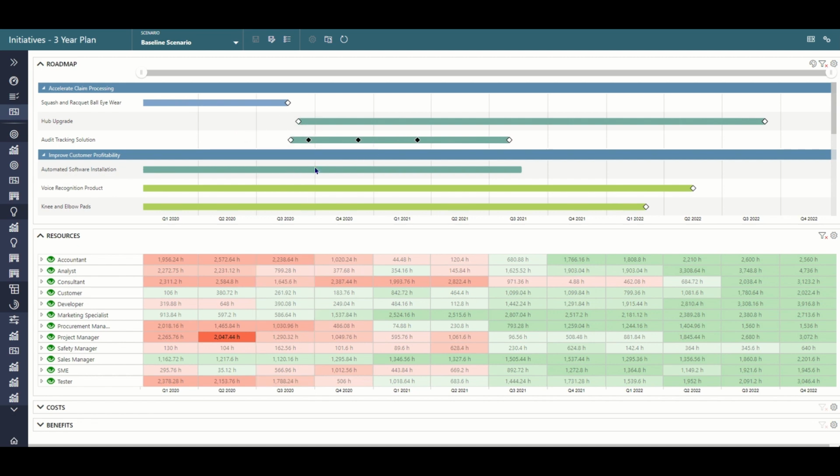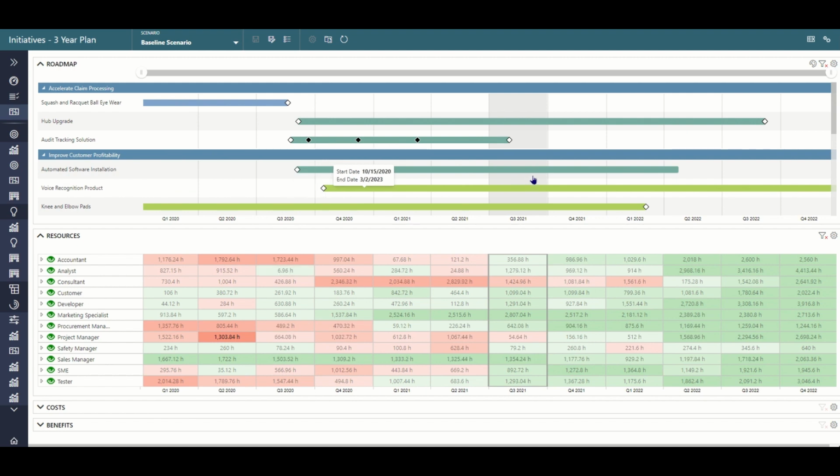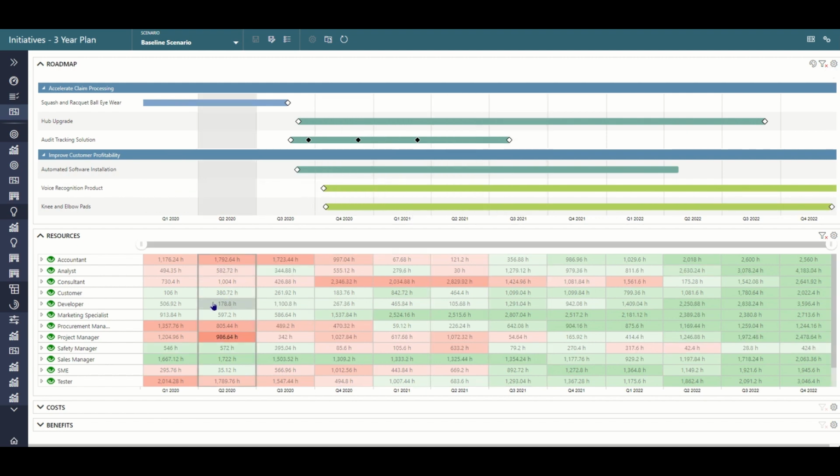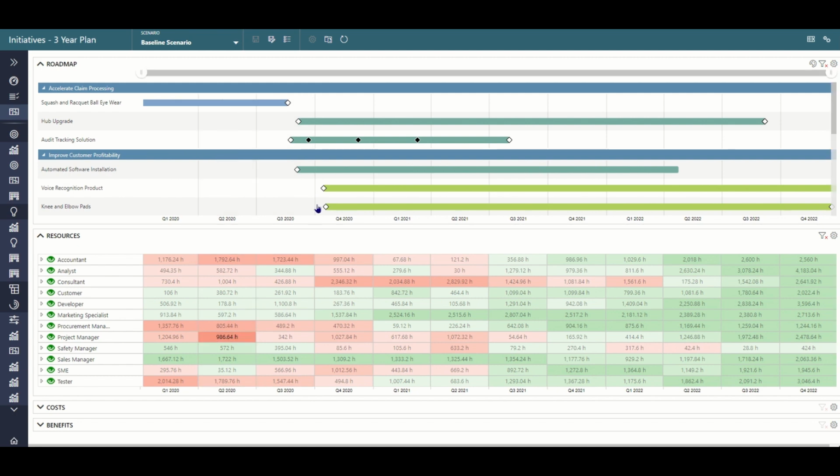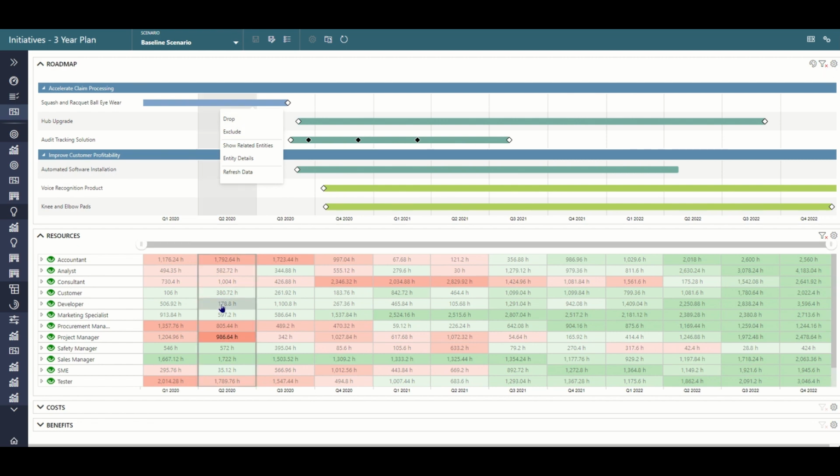And you'll continue to move these until you solve the problem of the overallocation. Now, in some cases, you're never going to actually solve that problem because you literally may just not have enough people to do this work. So then you enter a set of choices. Do you, for example, start to cancel some of this work? Do you move it all out? Or do you need to go hire people to do the work?